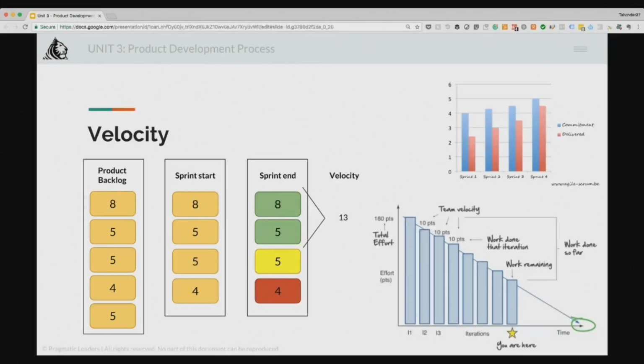So how is it calculated or how is it looked at? So the product owner can use velocity to predict how quickly a team can work through the backlog, because the report tracks the forecasted and completed work. You forecasted that it will be done in 5 weeks, and looking at what you completed, after 3 sprints you just finished 200 work hours, 200 units of work, which basically means you are behind, right?